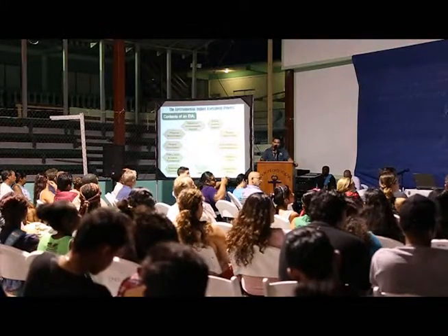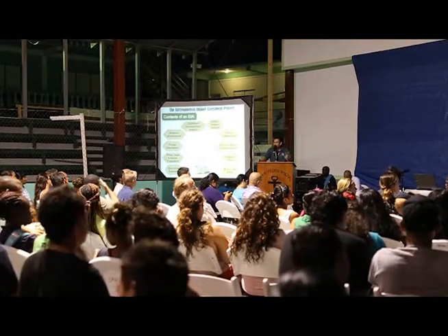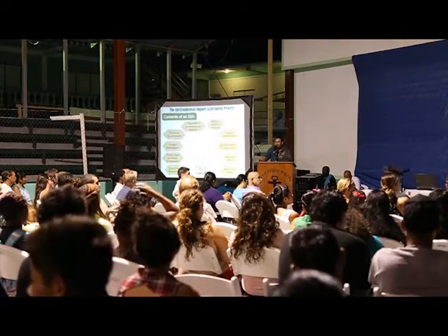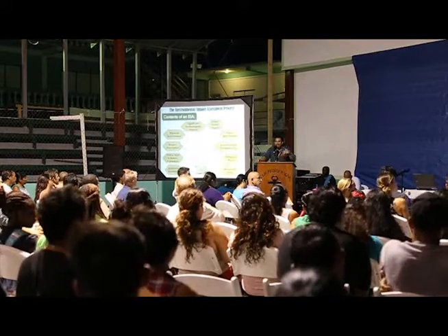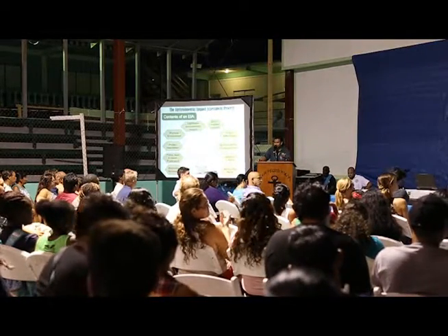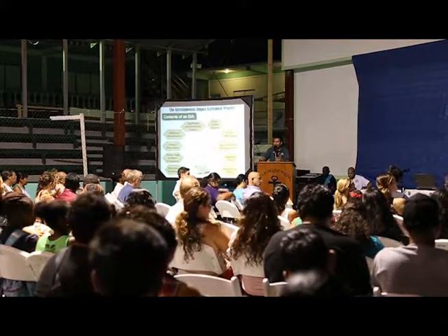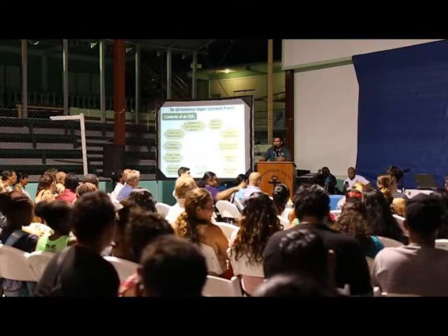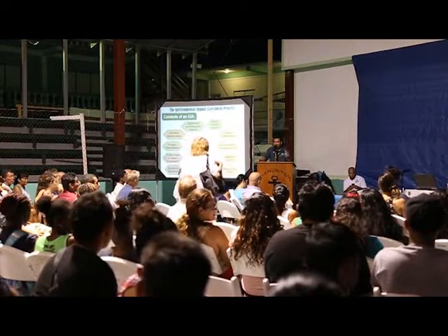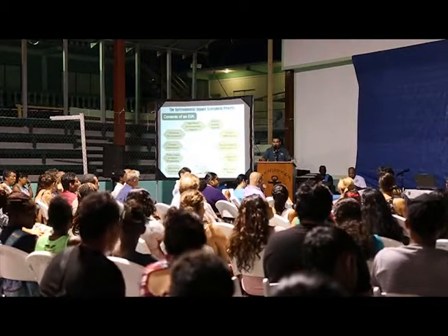It requires that you have an executive summary, and the executive summary is required to be 15 pages more or less in a layman's language so that the majority of the general public can understand and appreciate by just reading the executive summary what the development project is, where it is being proposed, what are the potential impacts, like I mentioned, both positive and negative, and for the negative impacts, how they are going to use the hierarchical preventative measures that I mentioned, which is the prevention, mitigation, and the reduction of potential impacts. So it has to do that in the executive summary, right?